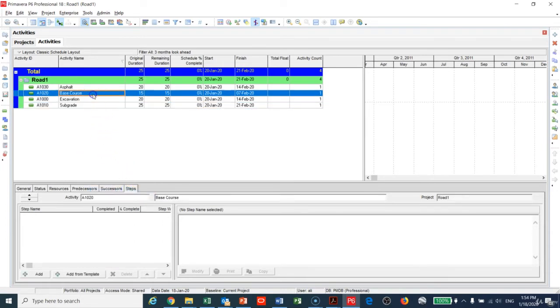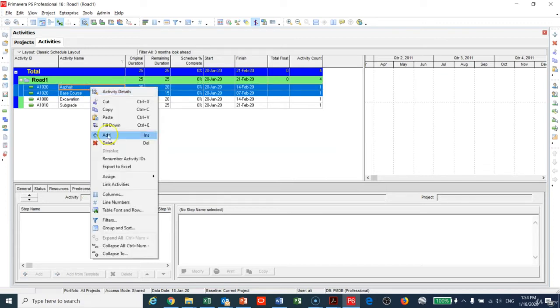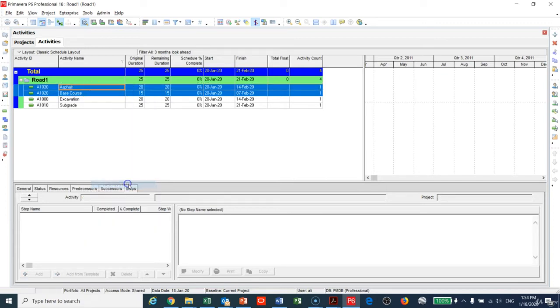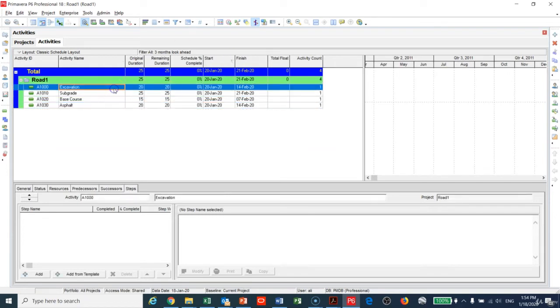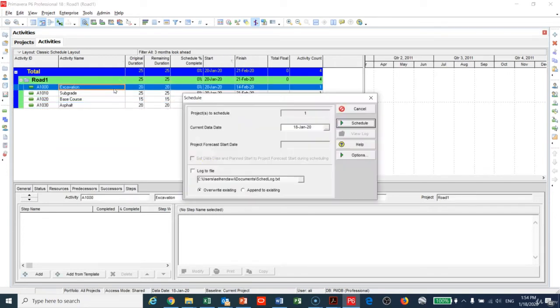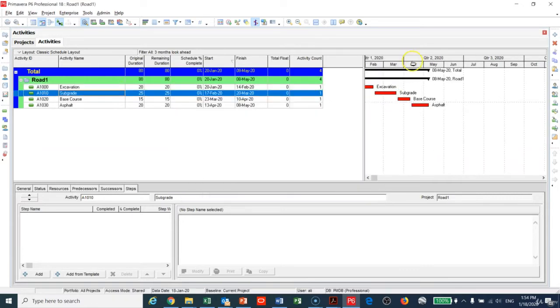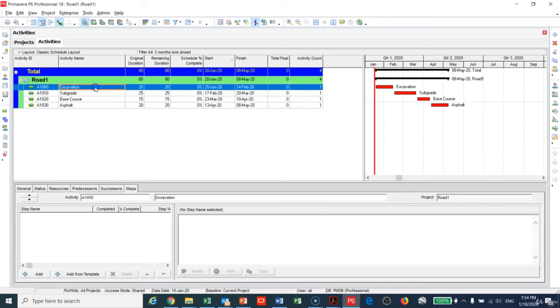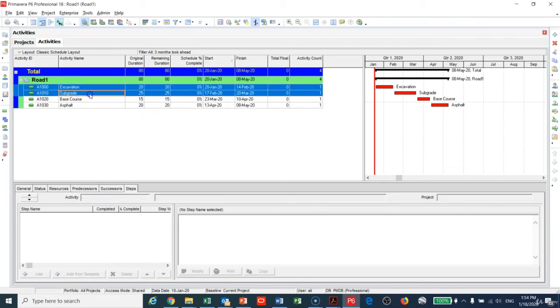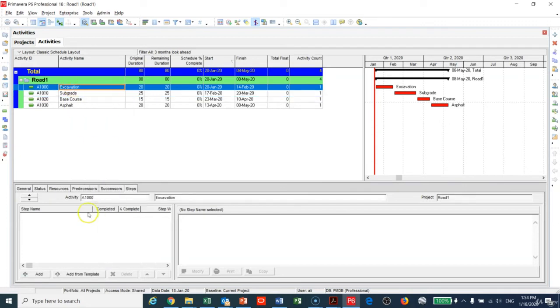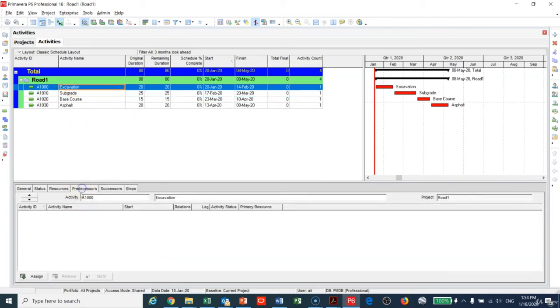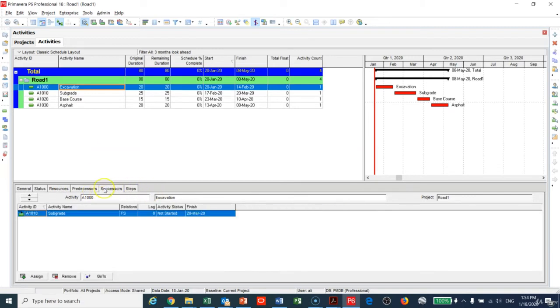Base Course and Asphalt, right-click and link activities, mix them by the start like that. After that, make F9 so that the program can give you the schedule. To link activities is easy: go and highlight and link.